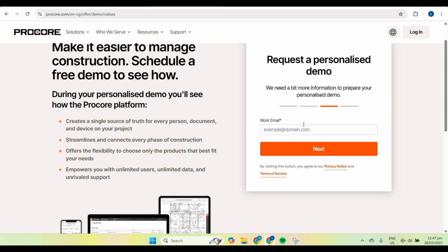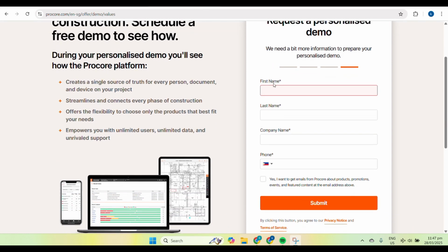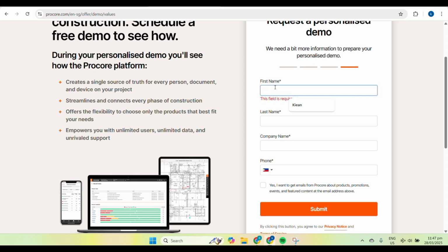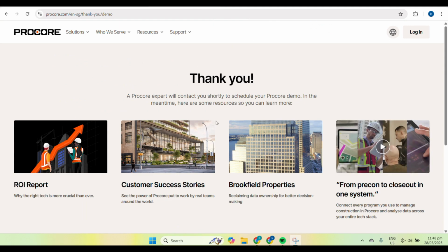You will be prompted to fill out important details, for example, the title, specification section, the type, and the due dates. Some key fields are the title, a descriptive name for the submittal, then the spec section, the relevant section from the project specification, and then the due date, which is the deadline for submission and approval.